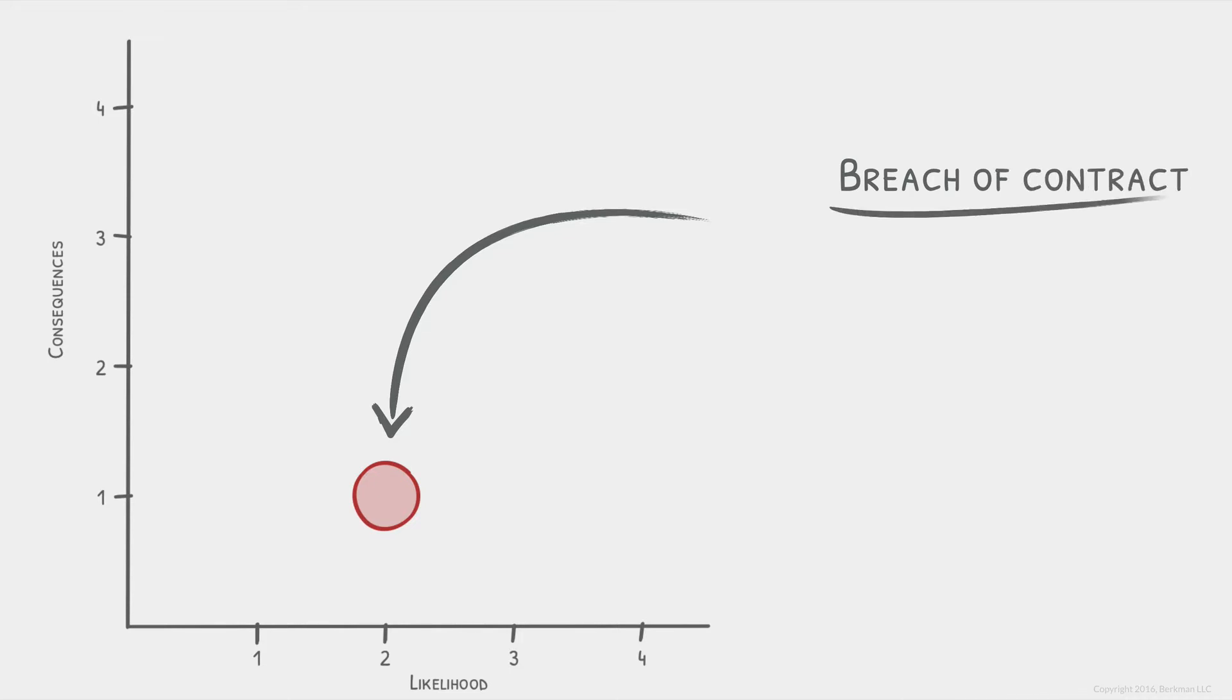Imagine that there is a potential breach of contract risk. After some risk analysis, covered in the process section, we conclude that it is less likely than not and rate the likelihood a 2. Based on the size of the contract and the liquidated damages clause, we rate the consequences 1 as insignificant or immaterial.